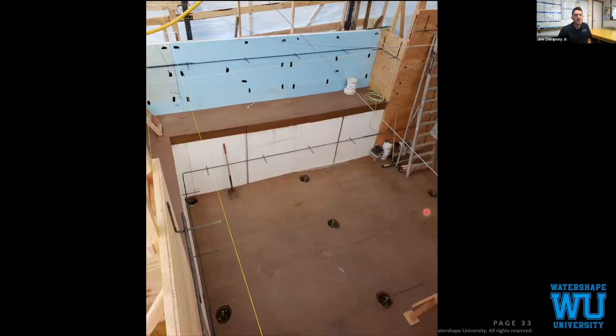Our geofoam blocks are installed. We've started to lay out our ring bars. Today is the day that our homeowner calls us and says, hey, I really want to add some speakers and a swim jet. So we scrambled, had a couple phone calls with Rick, and figured out which one we wanted to use. There's only one place to put it, and it's along this wall, which we'll see.